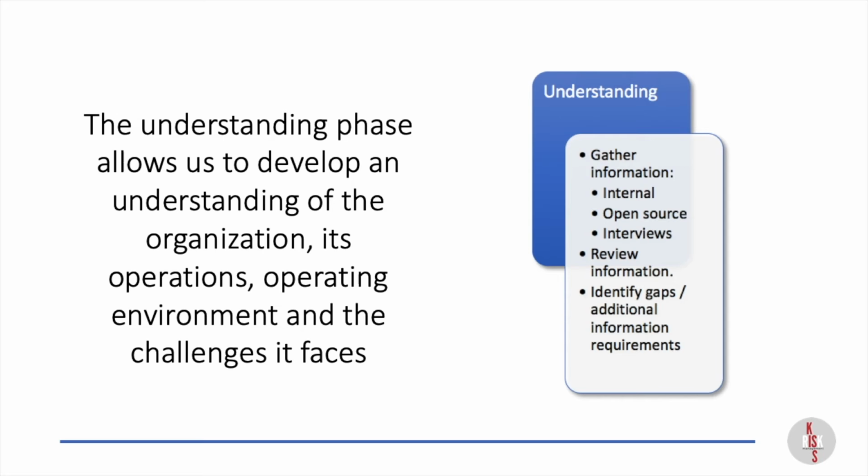If one person says, we have an excellent process for, let's say, crisis management, you may speak to someone else that says, we have no process for crisis management. So where does that misconception, where does that difference come from? Well, you may need to go back. It's an information gap. You may need to go back and conduct some more interviews or track something down.